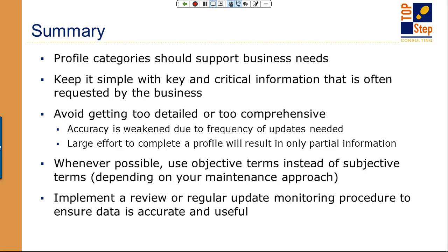So, to summarize, and I'm only a minute past due, profile categories need to support your business needs. Just be careful. Keep it simple. Key critical information. If you're not sure how simple is too simple, start out with one category and use it for a month and see what people think. If they all come back and say, this is nice, but we need this other category, and 80% of your people are telling you, I need this other category, well, you know it's time to add another category.